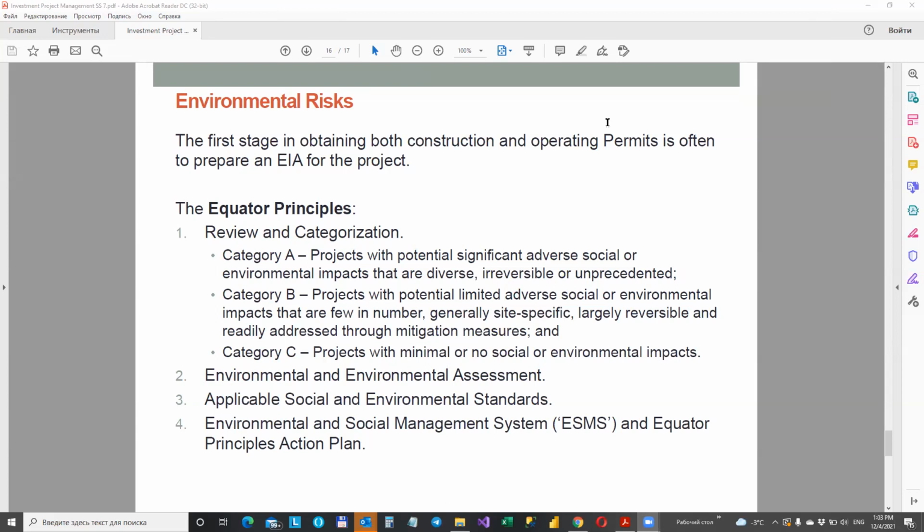Even if the project company is acting within the law, it may still be at risk on wider political grounds. Public opposition to the project may cause the host government, or the government of the country where the project is taking place, to reconsider its obligations under a project agreement. Similarly, the lenders themselves may find themselves under attack for supporting a project that is perceived by the audience to be environmentally damaging.